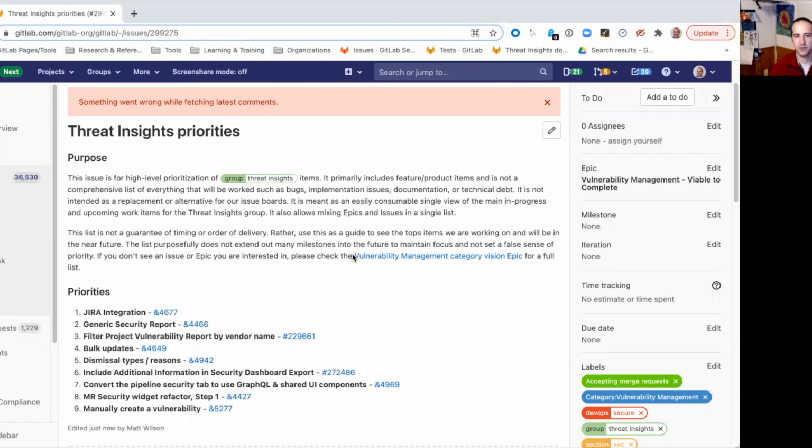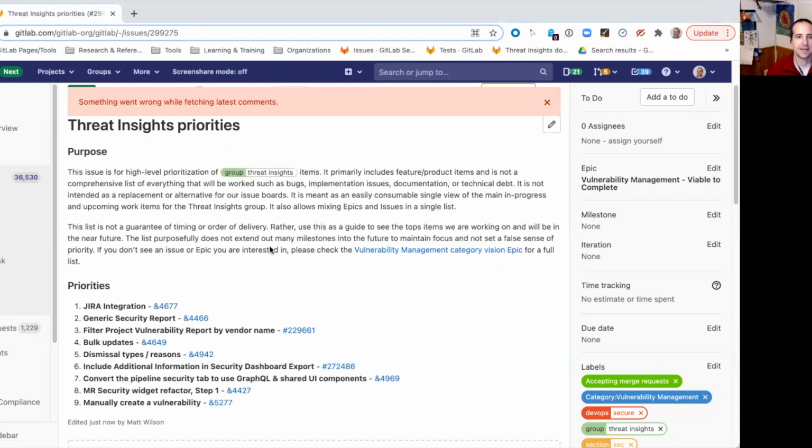The individual issues tend to be for smaller items. We use epics for a particular feature that we want to break down into multiple MVCs. Each MVC gets its own epic, and we find that it's an easier container to attach the different front end and back end tasks to, so it's not all in one place. And we can also have a separate design issue as well. So for us, this works.